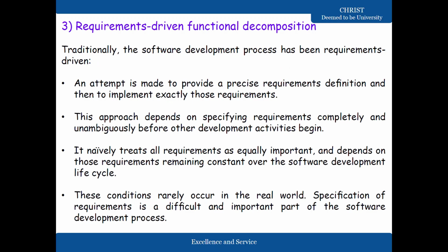Now, the third point is requirements-driven functional decomposition. Traditionally, the software development process has been requirements-driven. An attempt is made to provide a precise requirements definition and then to implement exactly those requirements. Okay, this approach depends on specifying requirements completely and unambiguously before other development activities begin. It naively treats all requirements as equally important and depends on those requirements remaining constant over the software development lifecycle. Now, these conditions rarely occur in the real world.